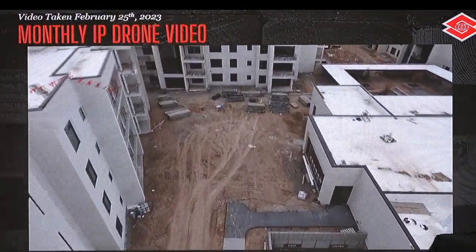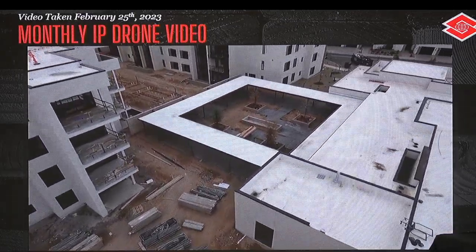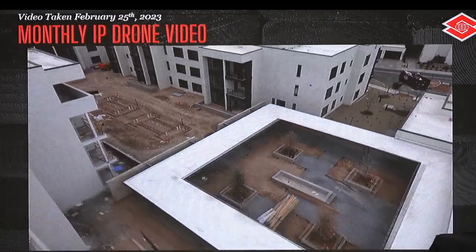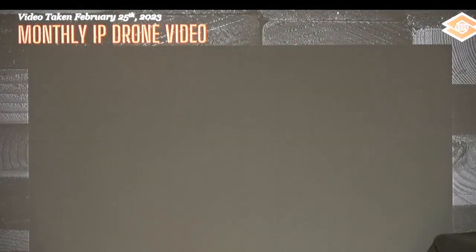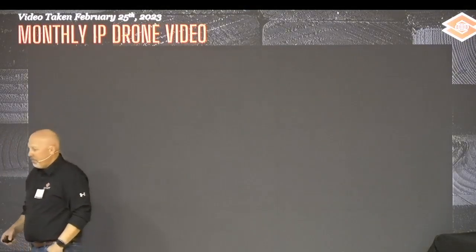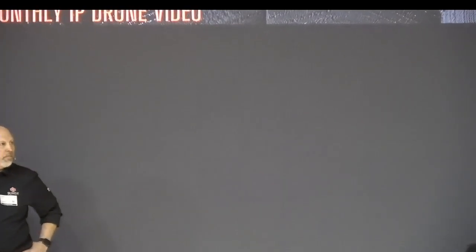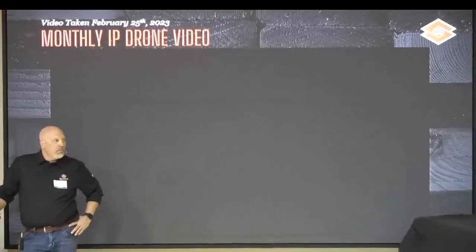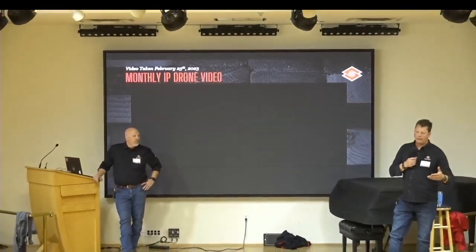And then this would be kind of like the interior campus, so this would be the courtyard, if you will, outside of Building F. The canopy's there, and the underside of the canopy's done, and those are the two areas where the upcoming water features go. So we're in the process of building those. They're permitted under Phase 3, which is why we haven't done them yet. Plus, we needed the access inside the courtyard to do all the outsides of the buildings.